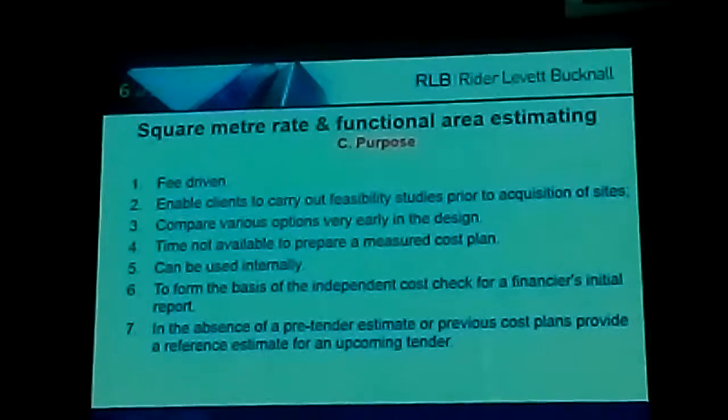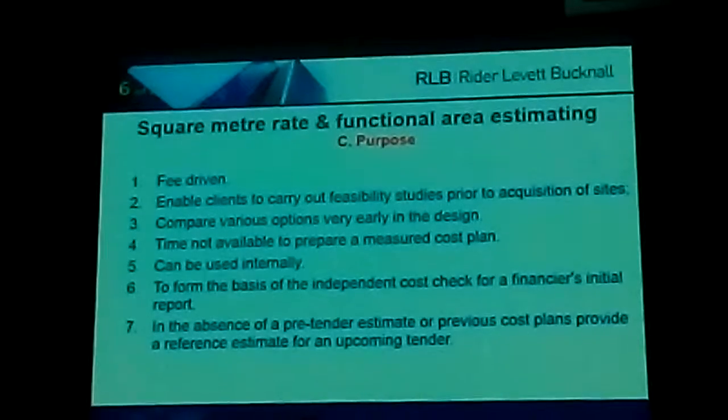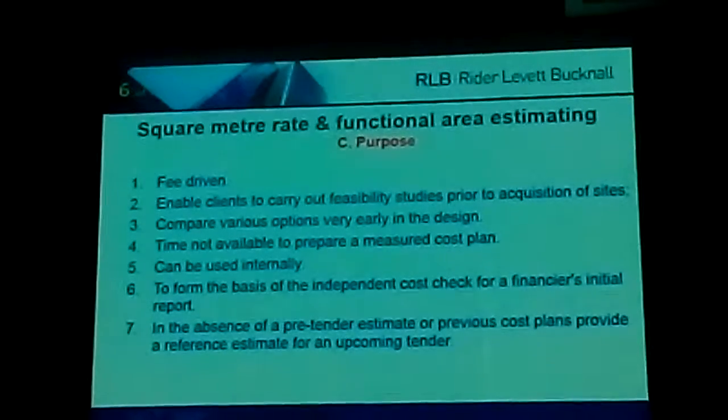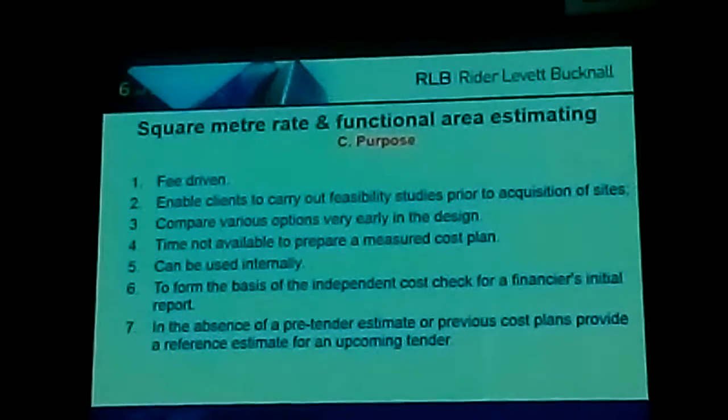They can also be used internally to set and confirm a project budget. They can be used as the basis of the independent cost check for a financier's initial report, and in the absence of a pre-tender estimate or previous cost plans, provide a reference estimate for an upcoming tender.